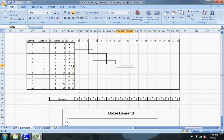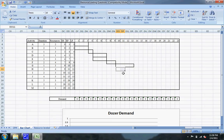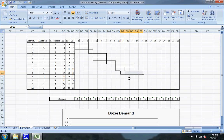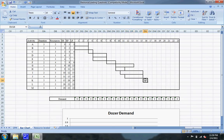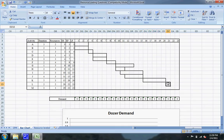If you don't see where I'm getting these numbers from, they're all right here in the CPM diagram. Activity H will start after activity F and goes until the eleventh day. Activity I starts on the eleventh day and goes till the fifteenth day. Activity J starts and goes till the fifteenth day. Activity K starts after I and J and goes till the twentieth day. And then Activities L and M both start after Activity K and go till the last day of the project.